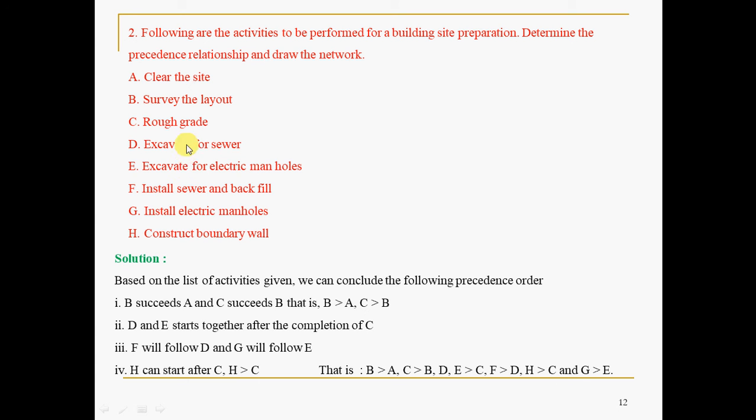So based on the concept. Fine. Then F will follow D. After completion of D, you can take F, and G will follow E. After E, G will take place. H can start after C, we can say. H should start only after C.